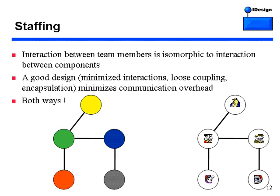Just like a good design has minimized interaction between loosely coupled components, a team mapped isomorphically to those components will also be effective — it will minimize communication overhead. A design with tightly coupled components results in tightly coupled team members. You'll spend more time in meetings, there'll be friction, and if somebody breaks something, things explode all over the place. A good design is not just crucial for long-term maintainability — it's crucial for fast time to market because it gives you the optimal team layout.